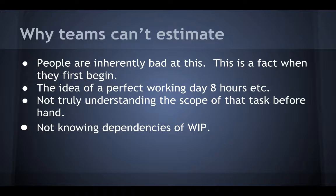The next step is estimating the time each task will take, and this is where things tend to come off the tracks. People are inherently bad at estimating how much time things take. Other Agile teams use t-shirt size hours or play an estimation game called planning poker. However, I've found it helps to divide all the tasks into so-called buckets. Each task is put into one of the buckets based on the estimated time to complete: half day, one day, three days, or a week. If a task is more than one of these bins, round up to the larger bin. In general, we underestimate more than we overestimate work. Anything larger than a week's effort needs to be broken down into more manageable tasks in the planning stage.